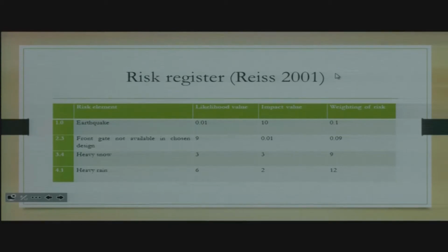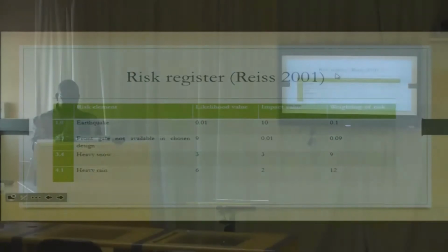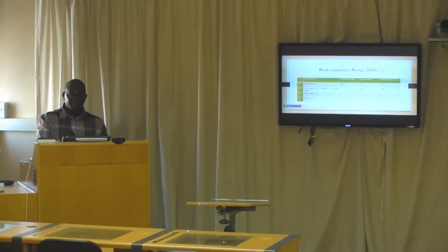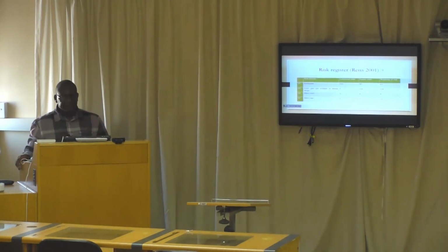So usually I tell students to use the whole digit, and then we can weight our risk by saying that those that would give us a final result or weight of 0 to, let's say 30, or rather 0 to 40, we say those ones are basically low risk.